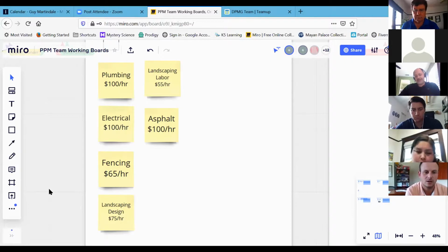Yeah, so for you guys, this is when you're working on projects that have a lot of contractors, subs, or individuals you're paying out to work on it. This is how you ask them to answer your request for quote, and the breakout will help in putting the budget together. Because if you get just a lump sum of everything together, it's $50,000 all inclusive for materials and labor, it's hard to break it out and put it into the buckets. So as you plan that, you can plan how you do your RFPs and RFQs to get information.